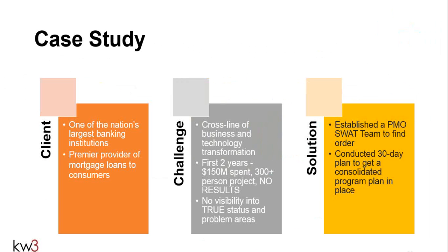We met with all the teams to understand where they're at. We created a questionnaire to understand exactly where they're at from a product standpoint, from their team standpoint, what their deliverables were, what the dependencies were, what the key issues were, etc. And by getting that information, we understood exactly where each team was.